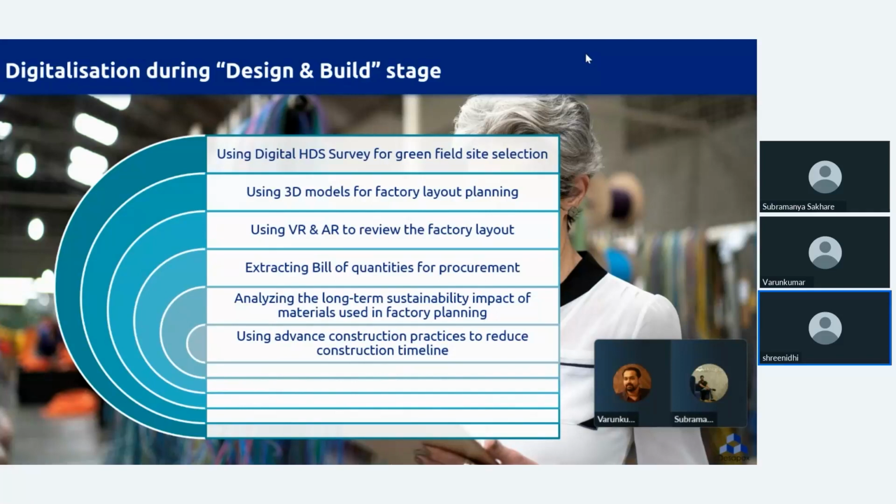as well, so that you have a target timeline of, let's say, 7 months or 14 months for opening your factory. So we work backwards and choose a construction methodology, or a project management methodology, which fits into that timeline, rather than realizing just 4 months before the opening that, oh no, we need another 6 months to close this, or something like that.